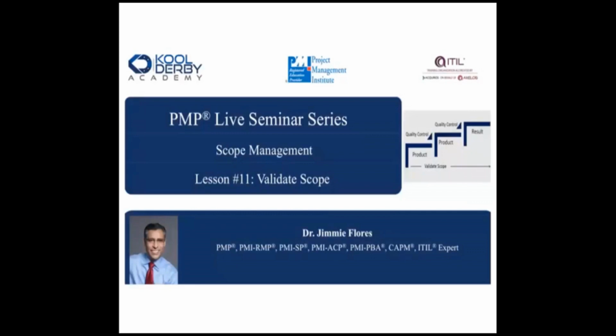I want to go through and talk about the next process, and that process is validate scope. If you've gone through my face-to-face training sessions, you know that I spend a lot of time with validate scope because it's one of those processes that is so critical before we close a project. We must first validate that the work was done right before we can close the project. So don't forget that. There's a big point to be made here, and that is that we can't move to closing until we've done validate scope.